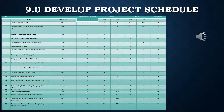It is also the difference between the early finish of the last activity and when the project can be completed on time. So the total slack is later finish minus early finish. If the total slack is negative, it means a lack of slack over the entire project, and the end activity must be accelerated.